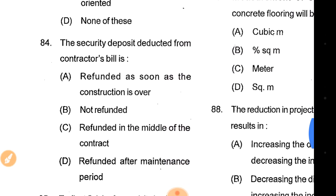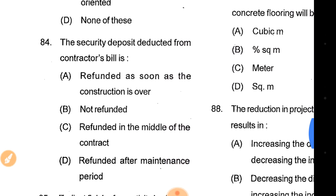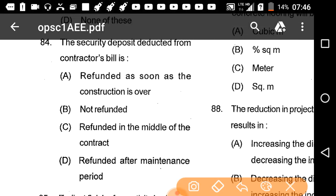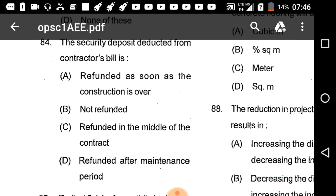Question 83: The security deposit deducted from a contractor's bill is refunded after the maintenance period. Option D is the correct answer.